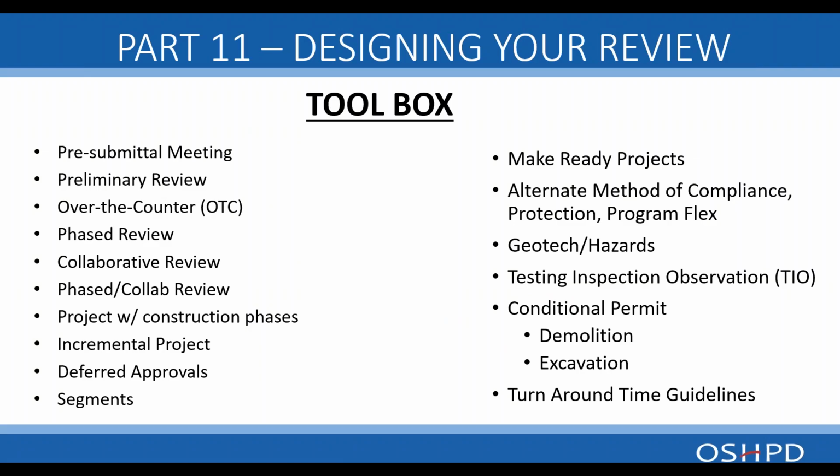The toolbox available to design your plan review process includes pre-submittal meeting, the preliminary review, over-the-counter review, phased review, collaborative review, phased collaborative review, a project with construction phases that we talked about in the earlier sessions that is different than the phases, again, in phased review, which are the design phases, an incremental project, deferred approvals, segments, make-ready projects, alternate method of compliance, protection, and program flex, the geotech and geohazards report, TIOs, testing, inspection, observation.